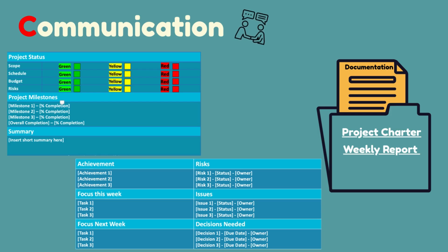You might have a question: how do you prepare all the documents we just mentioned? For meeting agenda and meeting minutes, the most important thing is to list out clearly what will be, or had been, discussed, and if any action is needed, who is the owner and the deadline. Format is not important compared to these things. For lessons learned, we might go through this later in another video, as we don't want to make this video too lengthy. But we think it is useful to show you how to produce a weekly report, as this is an important document for you to run your project.